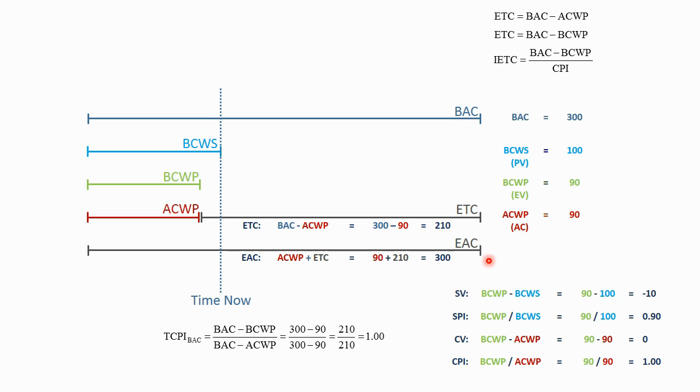We compute EAC because we want to be able to compare the EAC, the estimate at completion, to the budget at completion, and determine if there's a variance in how we're going to complete the project. So in this case,